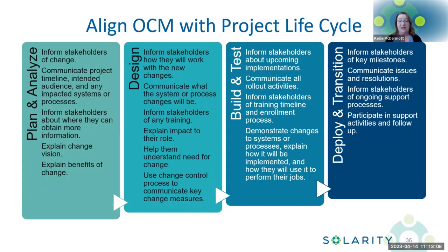And if it's not, here's some steps that you can take, or you need to make sure that you are keeping an eye on this, or you need to be collecting feedback from the people who are using this new process to ensure that they are able to use it in the correct way. You need to see who is creating workarounds for it, because gosh, it might be more efficient and we might need to make some new changes to this process also. So designing ways in that transition plan to help whoever is taking over, whatever environment that change is going into, to ensure that you're reinforcing that change after your project is done.